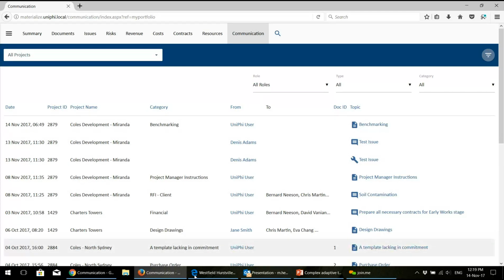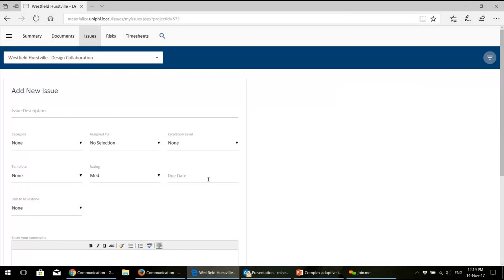You can engage with a contractor or with a client or even a subcontractor to get them to use the team member view. The challenge there is that they might only be working on your project 10% of the time, so it has to be simple. It has to be something they can easily get their head around and give something back to them, so that instead of emailing you an RFI that they then have to maintain in the Excel spreadsheet register, everyone can come in here. Everyone knows the current RFI register.